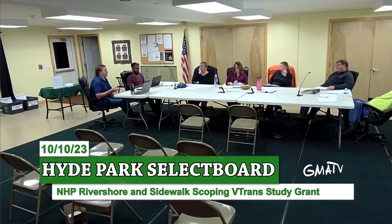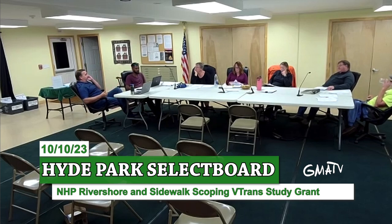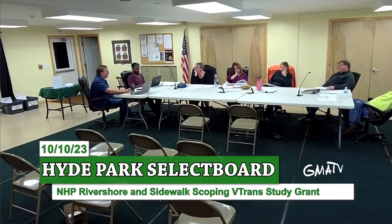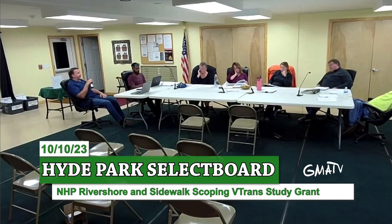And you can potentially, if you have enough local resources and skills with your crew, do things on your own without the state money. So that's always an option. I would like to say that Mark has a certain threshold with what he can do with his five people and equipment, like a large culvert. He doesn't have enough equipment or manpower to actually shut the road down and do a whole project without delaying all the other work. And some of these projects end up the same way. Sidewalk improvements sometimes fall into that. So this is where we try to identify the project. Yes.